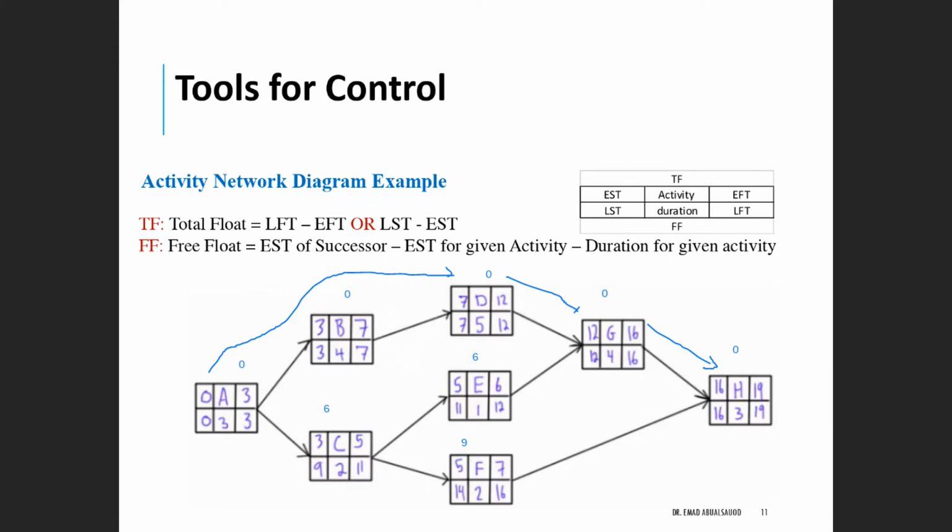So you can take more time than the specified time to complete those tasks without affecting the early start time for G. For example, if the early start time for this activity was 5, and you finish it after 2 weeks instead of 1, you still have finished it at 7, which is earlier than the early start time for activity G, and that will not affect the end time of the project. The same for activity F and activity C.